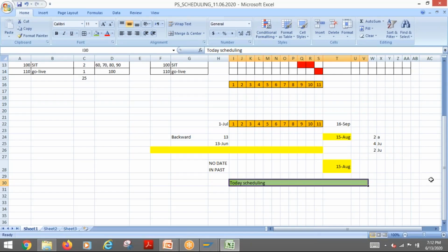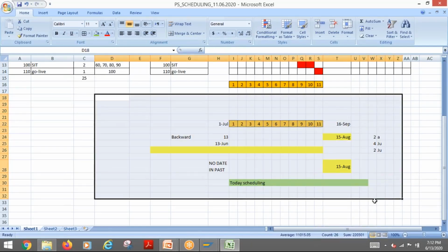Normally in project management, there is a concept called the time cost trade-off. So you can reduce the time by increasing the cost. Increasing the cost means you have to bring more people, more resources, and all those things. Instead of one person working, 10 people work, something like that. So this kind of scenario can be checked in SAP.